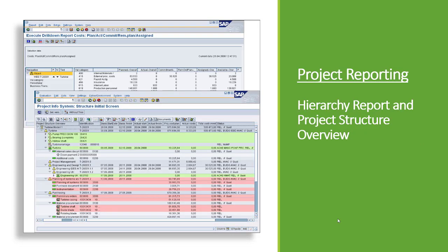Finally, we are coming to project reporting where we will be using different methods of the project reporting tools. Project System provides various standard reports for real-time reporting of financial and logistical project data as well as predefined BI content. Using report-to-report interfaces, you can directly navigate from one report to other more detailed reports. You can also define your own reports and queries depending on your reporting requirements. Project system reports include project and individual structure reports, resource and material reports, hierarchy, cost element and line item reports, claim and project progress reports.